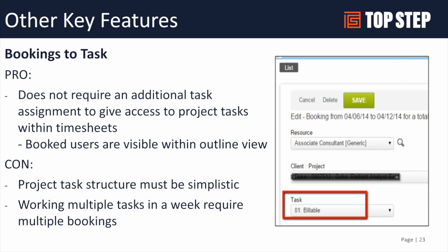Booking to the task, we find ourselves working with a lot of customers where this is a good fit. Generally this is more of a decentralized model, where the project managers are the ones in control of resourcing their own projects. And the benefit here is, instead of just booking to a project, you can actually book to a project and then a task.